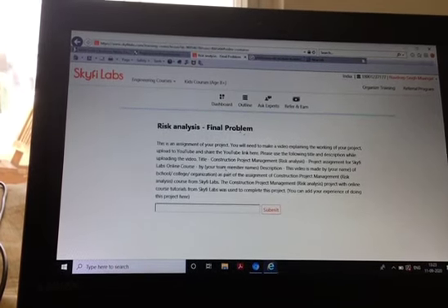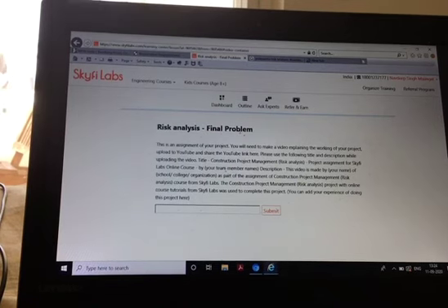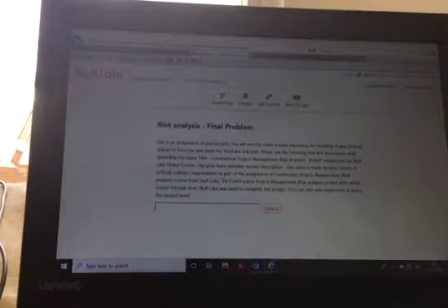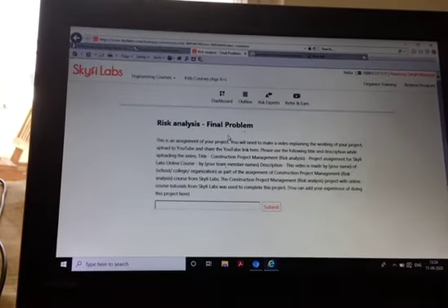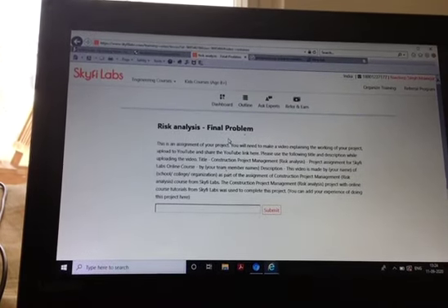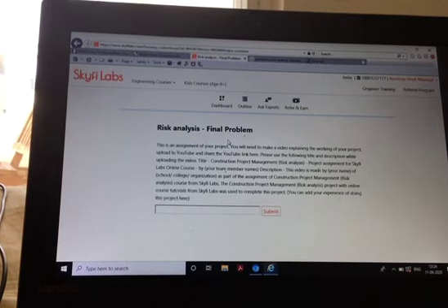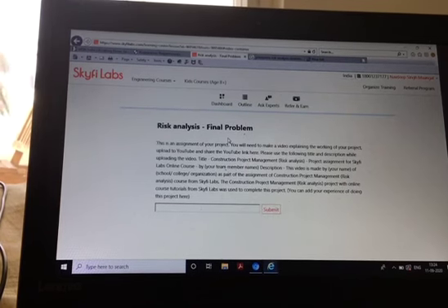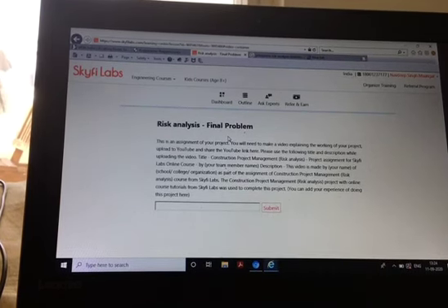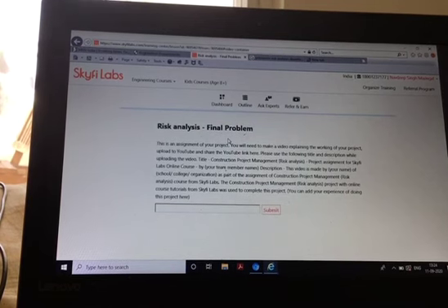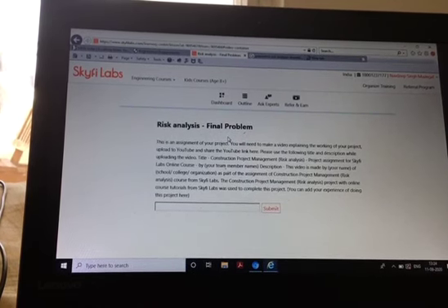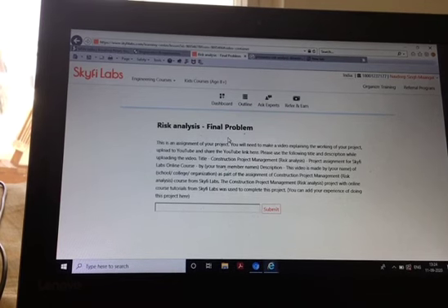So what is the procedure like? First of all, we assume the optimistic, pessimistic, and most likely time for the project or the activities. Then we calculate the expected time for each activity. Expected time, I told you the formula: a plus 4 into m plus b over 6. Okay, right? I did everything on the notebook, and I almost remember the formulas now.